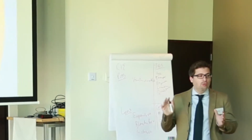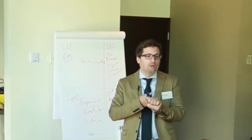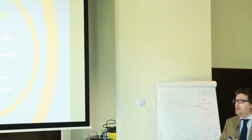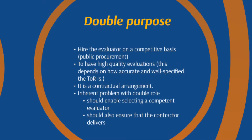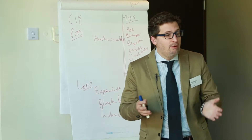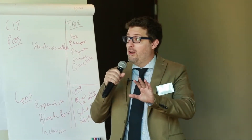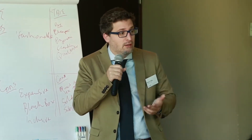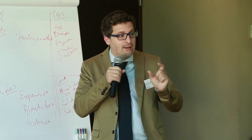The most important issue with the Terms of References in our environment is the double purpose of the document. On one hand you want to do the Terms of References for public procurement, to select the company or evaluator who will do your evaluation. On the other hand it is also a contractual agreement, so there is an inherent conflict in this document. You want it to be as defined as possible, but you also need to use it for public procurement.